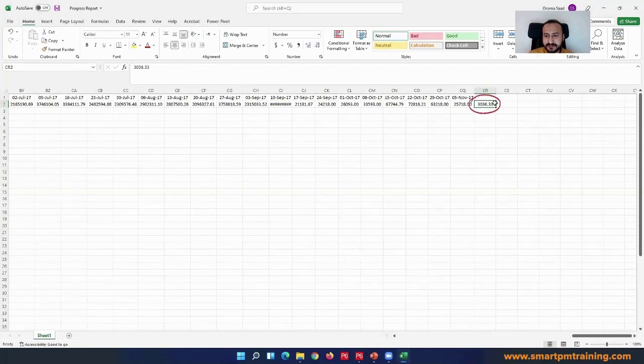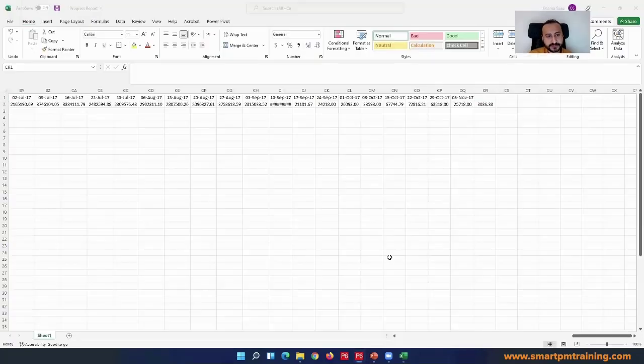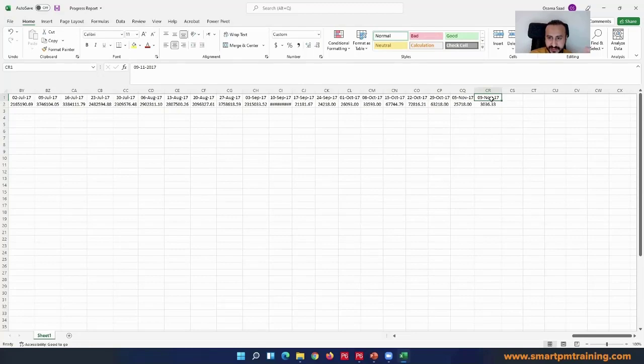But what about here? I have additional values here, right? Like that, it doesn't belong to anything here. Let's go to Primavera. My project completion is 9th of November 2017, but I have allocation up to 5th of November, okay? Not 9th of November, okay? So my project completion is 9th of November, which means I have to write it manually, 9th of November 2017. I know it's a little bit tricky, and I will explain it again in a different way.